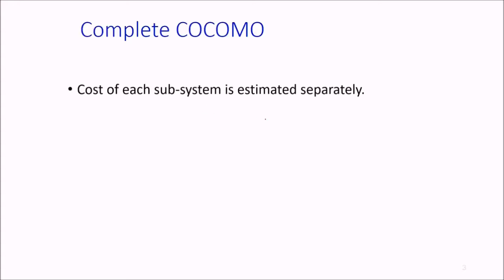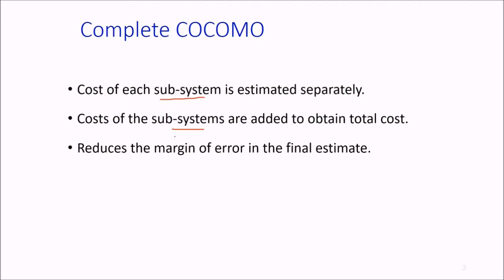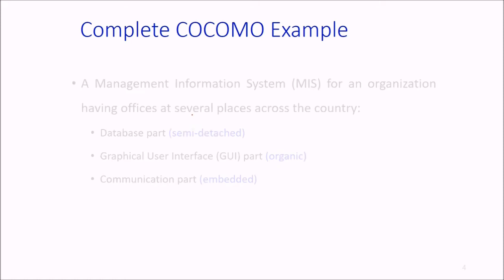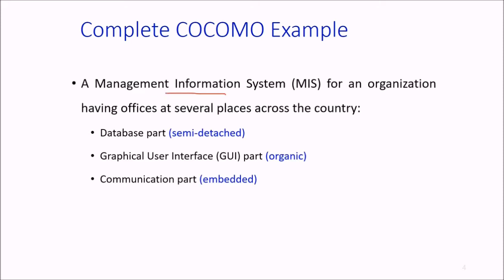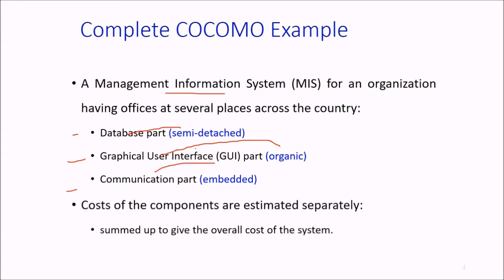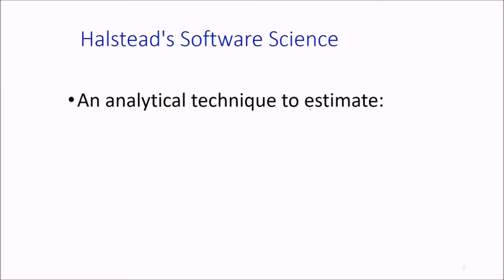So we have complete COCOMO. What it does is that it computes the cost of each subsystem separately or distinctly. The costs of subsystems are then added to obtain the total cost. This actually reduces the margin of error in the final estimation. For example, a management information system for an organization having offices at several places can have database part, graphical user interface part, and communication part. The database part would be semi-detached, GUI can be organic subsystem, and communication part can be embedded. Costs of components are separately computed and then summed up to find the final cost.